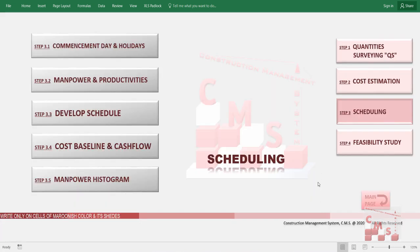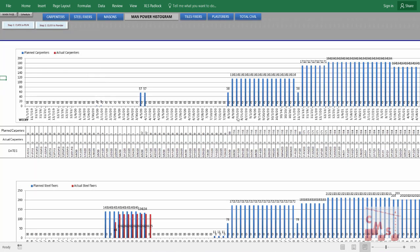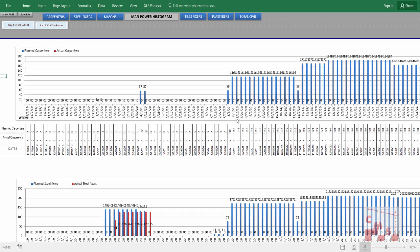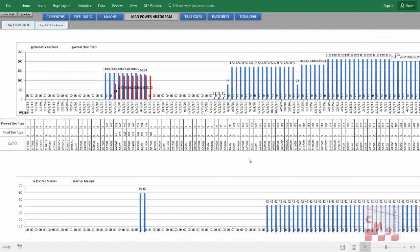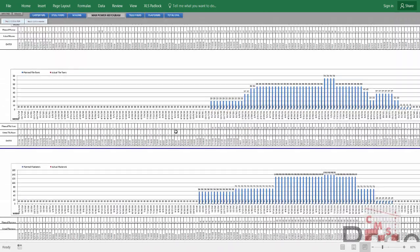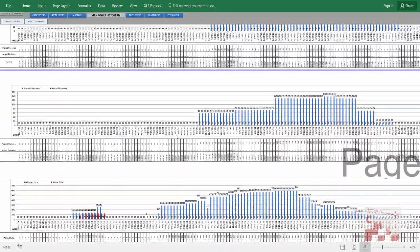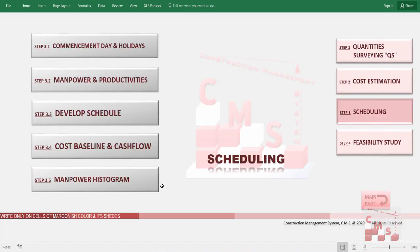CMS will also produce the required manpower histogram, allowing you to know from the beginning of the project what civil manpower is required — carpenters, steel fixers, masons, tile fixers, plasterers — and the total civil manpower. It gives a full histogram for the amount of manpower and the timing of deploying and deploying them, automatically. This also allows you to know the capacity the company requires to work on this kind of project.